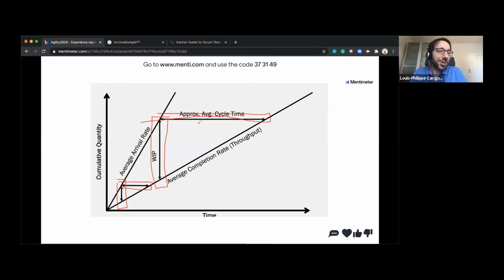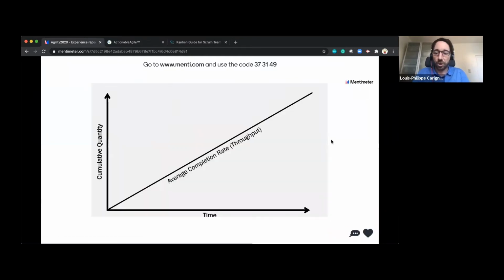which is all about limiting work in progress. And I've seen a lot of Scrum Masters focusing more on limiting the work in progress of a column. Where I want to take folks here is not on a column, well, on one column in particular, and it's going to be the ready column. It's not going to be the in development column or the in review column. It's going to be the ready column, or the first column of your sprint.